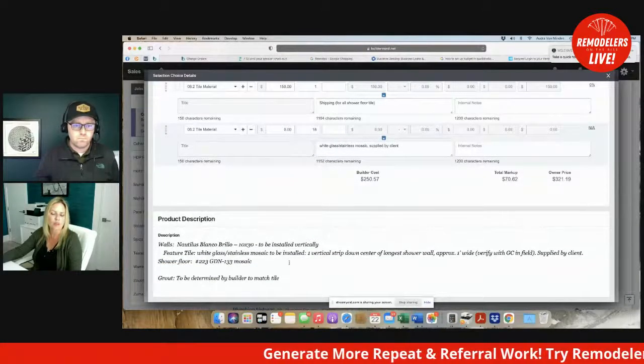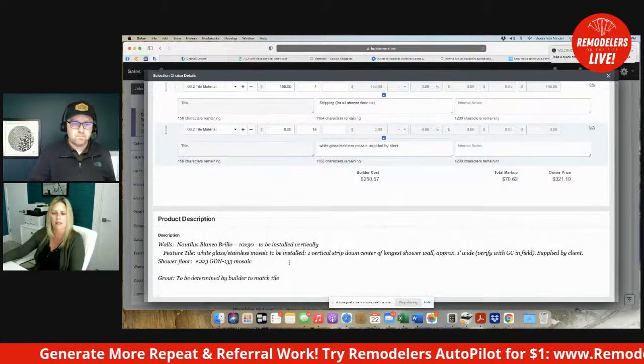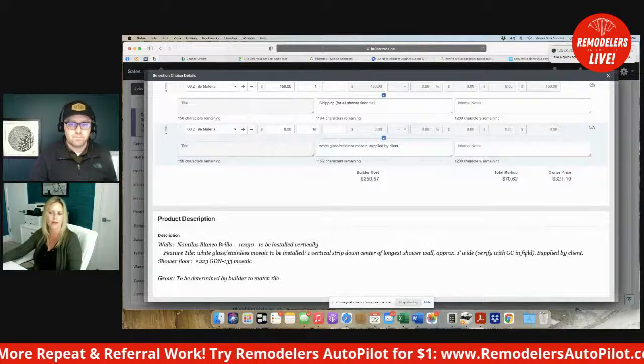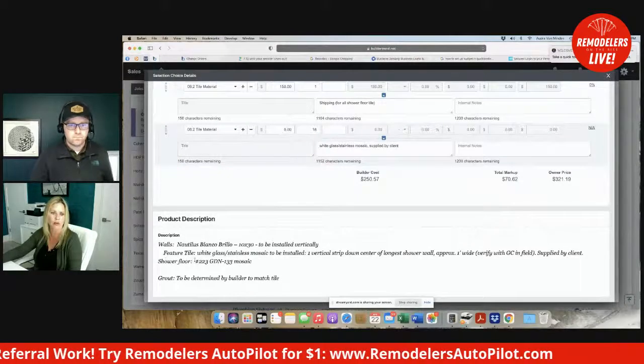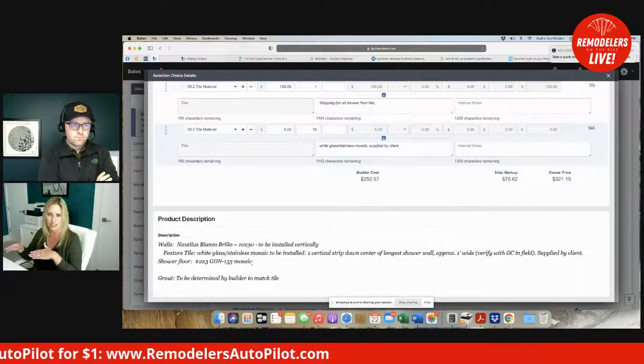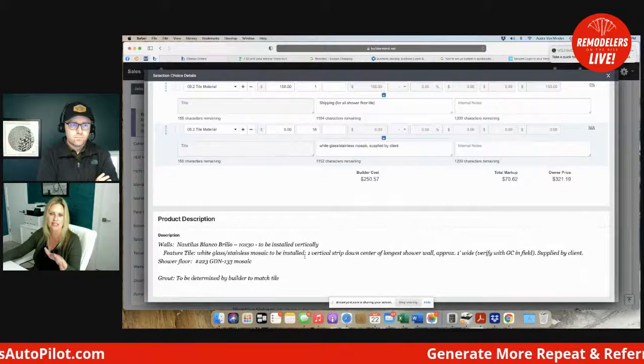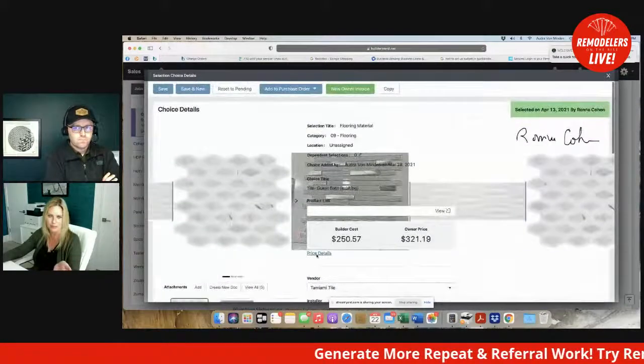Okay. This is also where installation specifics go. They want it in a brick pattern. They want it in a staggered pattern. They want, et cetera, grout colors, whatever. I try to put it all in here to eliminate any controversy when we go to install it. So I review this in detail with the client. It does make a nice presentation to them.